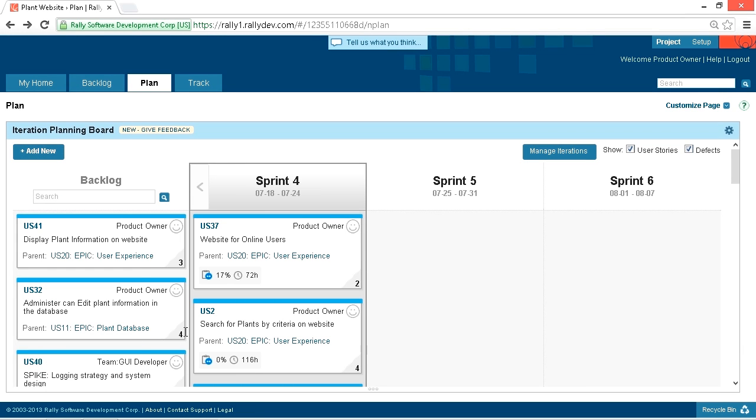They should have a relative size and story points, an estimate of effort, and they should be sized so they can fit in a single sprint. The work to get the backlog and the PBI sprint ready is done in the product backlog grooming meeting.